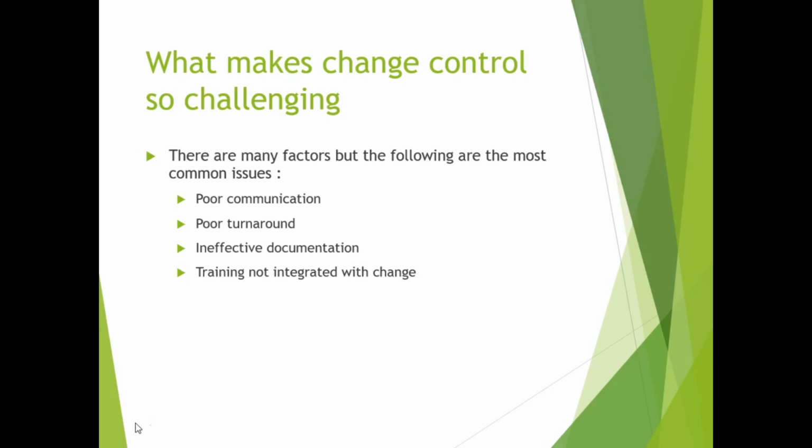The problem becomes worse when there is an unexpected change, for example, a deviation, and supporting data is not generated in a timely manner. So delays may also result because of failure to recognise the urgency of a change and the absence of a contingency plan for certain types of changes.